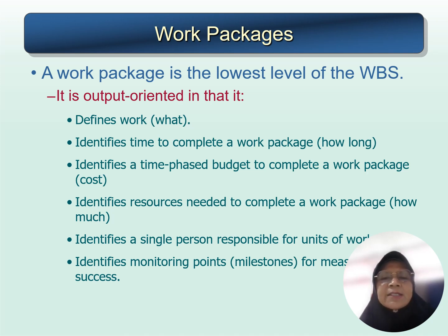It identifies the resources needed to complete a work package, meaning how much resources, how many people. And then it identifies a single person responsible for units of work. It identifies monitoring points or milestones for measurable success.